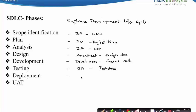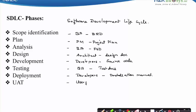Now the software is ready to be deployed. In the Deployment Phase, the Developers with the assistance of the System Administrators deploy or release the software to the client. The Installation Manual is referred to for the deployment purpose and contains the steps to deploy the software. The last step is User Acceptance Testing, wherein the real users test the software with the assistance of the Business Analyst and the QA, by referring to the User Manual.